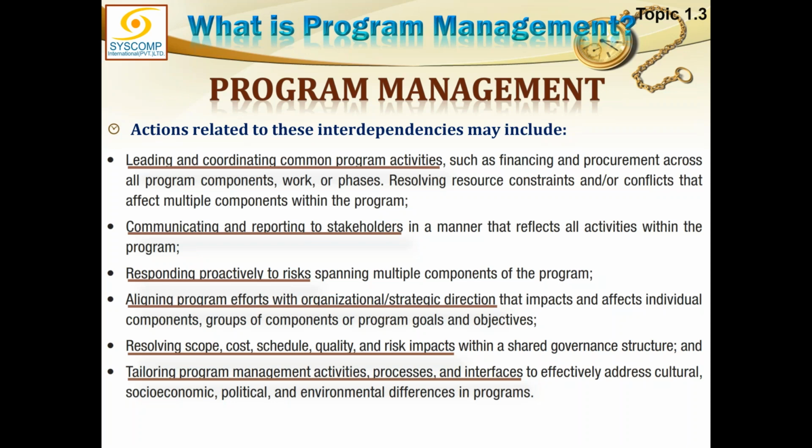So this program governance is further broken down to a project governance level, right? So project governance is directly responsible for developing the project management plan. Not exactly the governance is responsible. The project manager is responsible for following the project governance framework in developing the project management plan, exactly as the program manager is responsible for following the program governance framework to develop the program management plan. That is the relationship, and this is where the guidelines have been provided for scope, time, cost, and everything, and those guidelines have to be adhered to.